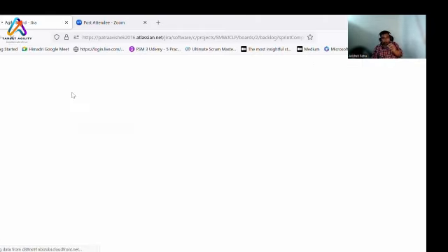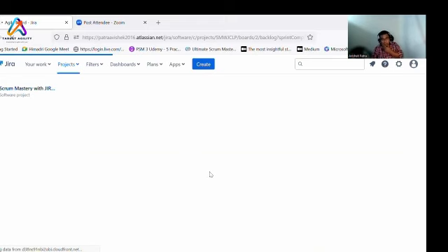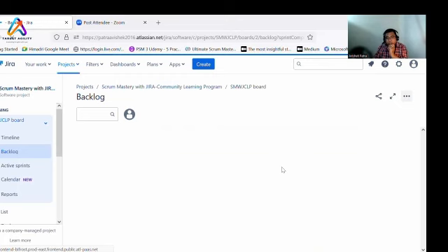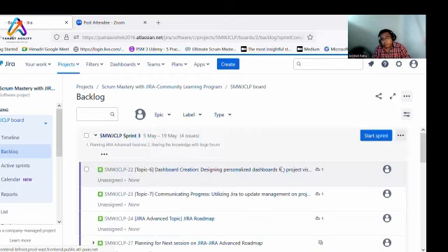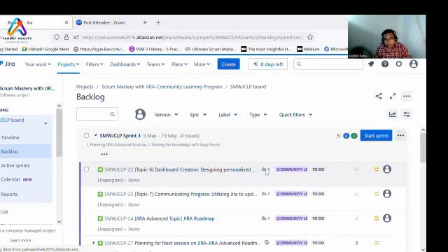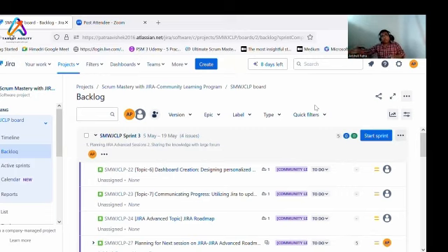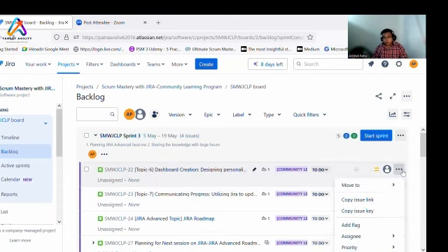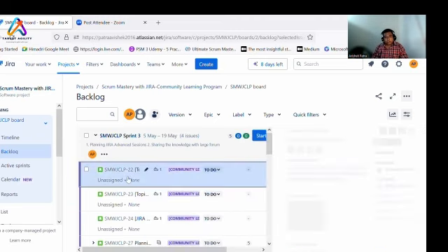The indicator that is there mentions the number of releases that the ticket is tagged to. If you see here, it's one. Now sometimes a scenario may happen that you are doing a particular piece of work, but it will go into multiple releases. Then you can also tag the particular Jira ticket with multiple releases. Okay. How can you do that? Click on that Jira ticket.